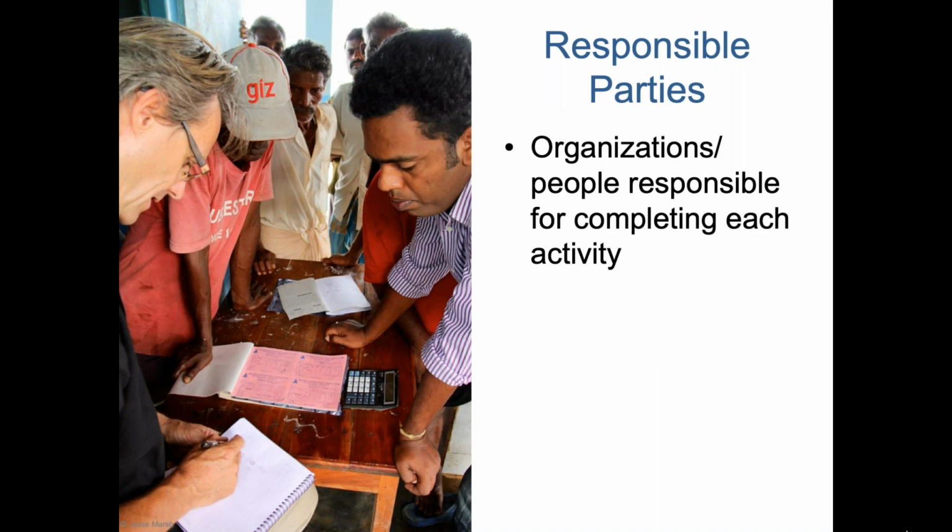And again, I know that this might seem obvious, but the reason that I'm stressing this so much is because the tendency can also be to try to go through the entire standard in order. We find this with our assessment team members as well: you try to do it in order, and the outcome indicator comes before the management indicator, which comes before the information indicator in the chronology of the way the standard is written. You don't have to think about it in that order. I know that everybody knows this, but it's helpful to remind ourselves, and oftentimes it makes the most sense to think about it in the reverse order.